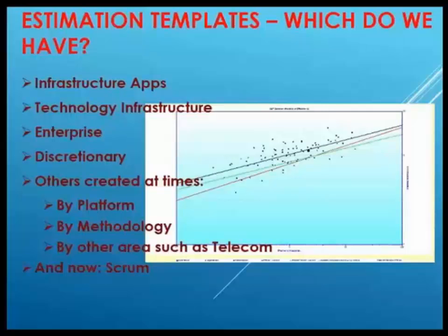And then of course when you want to apply the project historical data, you want to apply it as specifically as you can get. For example, you might be doing some batch processing on a mainframe. You try to get that sort of historical data when you want to apply it. And if you can't, you get as much other data as you can, and get as close as you can.